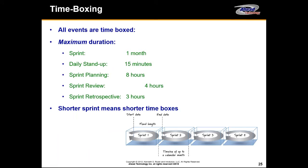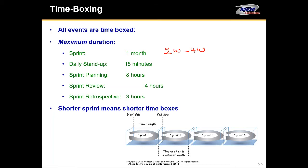Here is a quick summary of time boxes and time limitations. A sprint is maximum one month — two to four weeks. The daily stand-up meeting is 15 minutes — that's a fixed limit. Sprint planning is maximum eight hours. Sprint review is maximum four hours. Retrospective is maximum three hours. These time limitations ensure we are very focused to complete the job within that limitation.